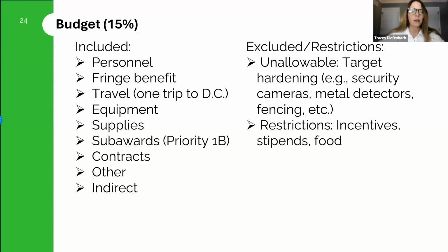There are specific considerations and requirements that need to be taken into account for subawards and procurement contracts. It is important to read through the NOFO and the DOJ financial guide. For example, entities managing subawards are required to conduct a risk assessment of all subrecipients, pass on all award conditions to the subrecipient, and monitor each subrecipient.